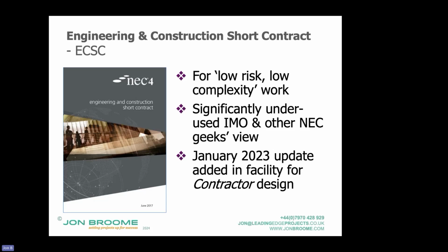Okay. So for me, if I'm letting a low risk, low complexity project, this is the one I've used. I've used it 3 times on my house, right? And for the local builders, they either ran away at the mention of a contract, or I just took them through it very quickly in 15 minutes and said, here's an early warning. If you spot a potential problem, tell me. Here's the list of events for which you get paid extra.